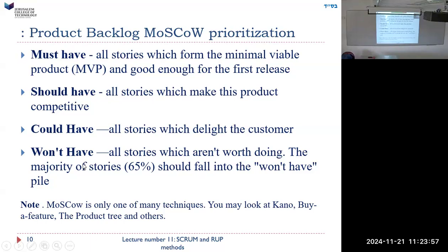By the way, what if there is a story that would take more than a sprint to do? It's impossible to do it according to the system, because every story has to be doable within a sprint. So you have to break it down.